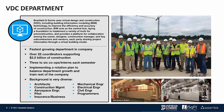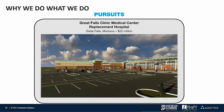Whether it is laser scanning, robotic layout, or drone flights, we strive to provide valuable and central content for our clients and our team. We're going to showcase our Piedmont Hospital project, but here are a few examples of what the BDC department's involvement may look like on any given job. Working with the pre-construction team is certainly one of our more common initial involvements. On the Great Falls job in Montana, all we were given was one floor plan, some pictures of the existing site, and a napkin with some sketches. Using our model and Assemble, we were able to generate model-based quantities for the estimating team and created visuals to help the client understand what was represented in our estimate.